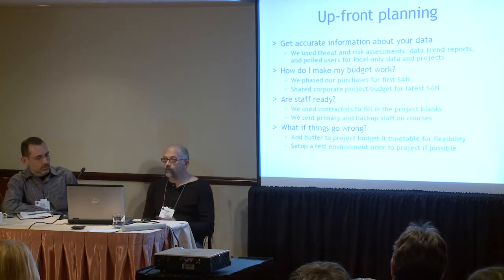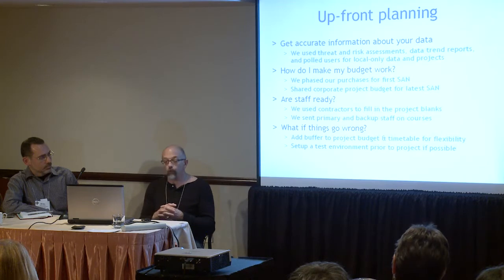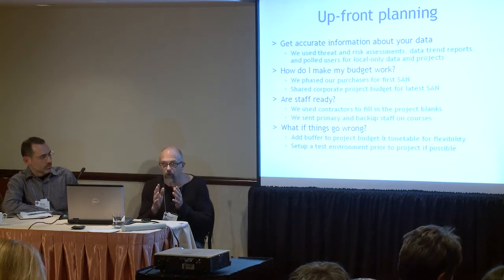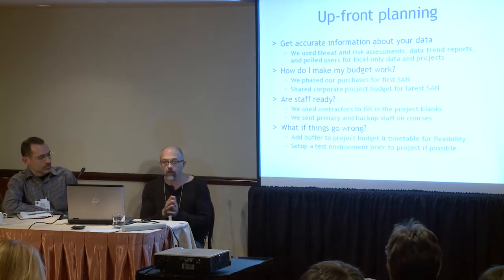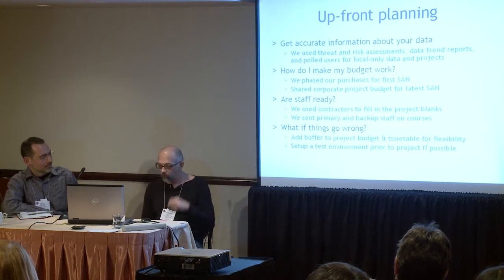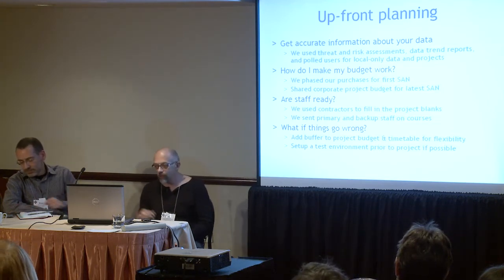And of course, as everyone knows, something's going to go wrong. So, first of all, make sure to add some sort of excess to both your project budget and your timetable to allow you to make sure that you don't run into problems that will cause your project to go very sour and cause management to look at the project and wonder whether you are doing what you should be doing towards the corporation. Also, please, if you can, we suggest you set up some sort of test environment so that as you're getting these products set up and tested, any problems become exposed before it becomes a production problem.